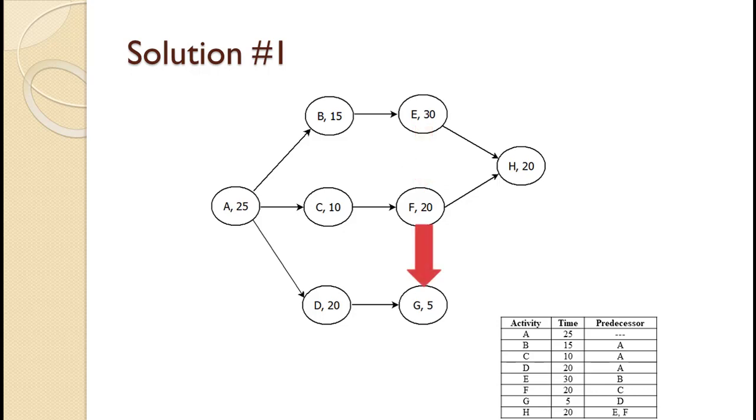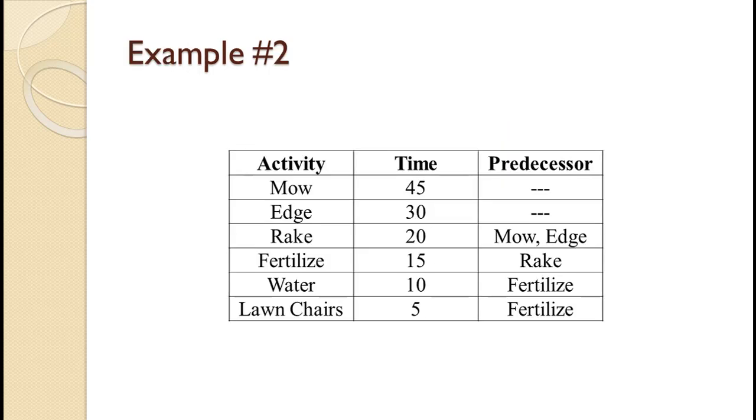Note that we end up with two activities, G and H, with no followers. This is absolutely fine for a precedence diagram. We will, however, come back to this later. H is our last activity. It has both E and F as a predecessor. That completes the diagram.